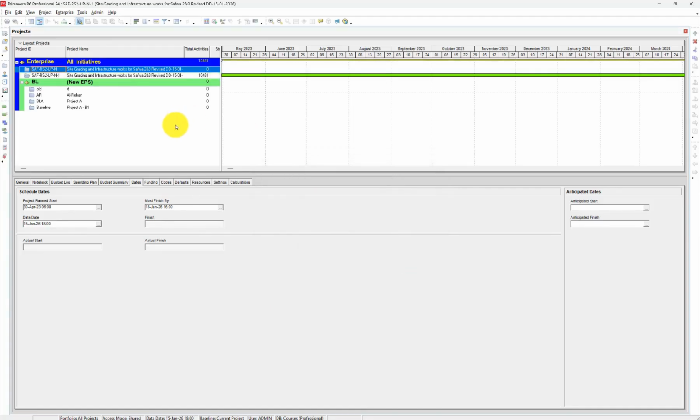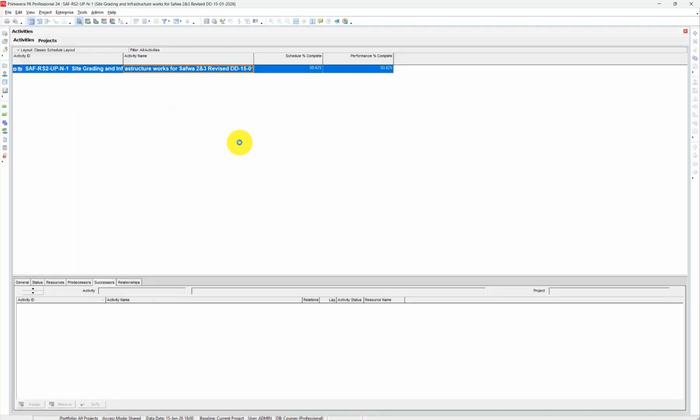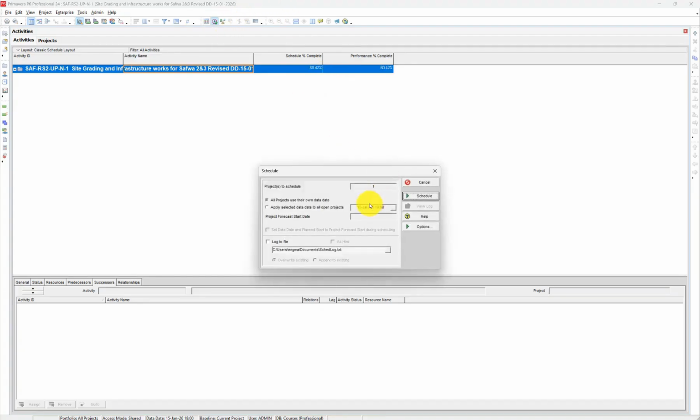Right, once it's finished importing, you open the project. What will you notice? The earned value matches the planned value. Of course, there might be some activities that don't align properly. Why is that? As we mentioned, if you have a data date and an activity that takes action after that data date, this will cause a problem. Or if you haven't set up the calendar in the schedule from the beginning.